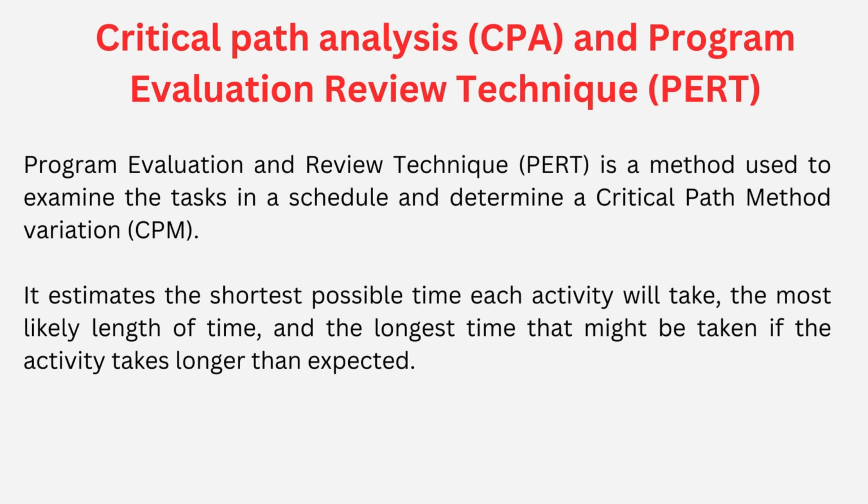This is the Program Evaluation and Review Technique. We call this PERT. PERT is a method used to examine the tasks in a schedule and determine a critical path. It analyzes the time required to complete each task and its associated dependencies to determine the minimum time to complete a project. So it estimates the shortest possible time each activity will take, the most likely length of time, and the longest time that might be taken if the activity takes longer than expected.